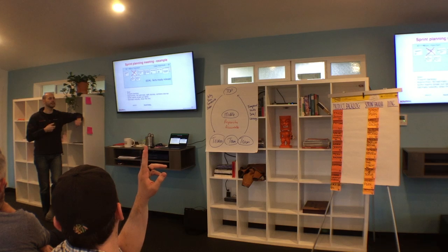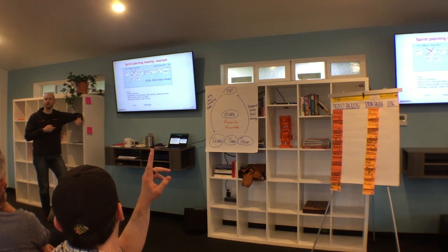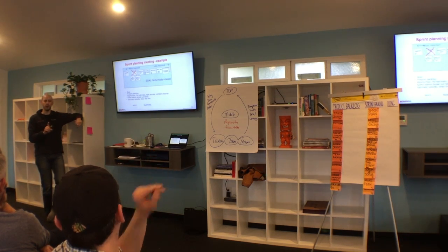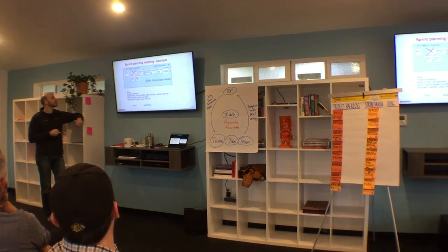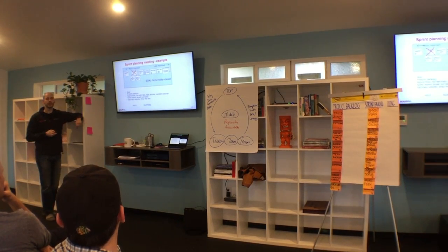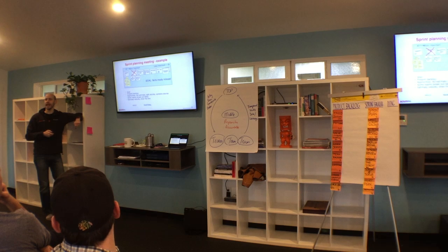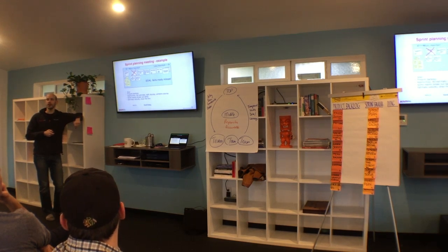So they've clarified. They delete the parent story and they've replaced it with 2 smaller stories. This is during sprint planning. Then they say deposit. Team, are we all on the same page as to what deposit means enough for beta ready release? We think it means these tasks: write a failing test, author automated acceptance test, reduce the technical debt around it. We think it means that. Product owner, if we show you the results of this at demo, is that exciting and meet your wish of beta ready release? The product owner says yes.